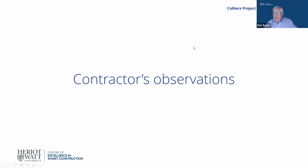We have a question in the chat that goes right to what you had raised, Ahmed, about forms of contract. So the two questions you had were really the forms of contract governance and structure. To answer the question in the chat, there are about 5 different well-known form contracts for the delivery of IPD projects. In Canada, we use something called CCDC 30, which is sponsored by a group that was formed by the Construction Association years ago to develop standard contracts.